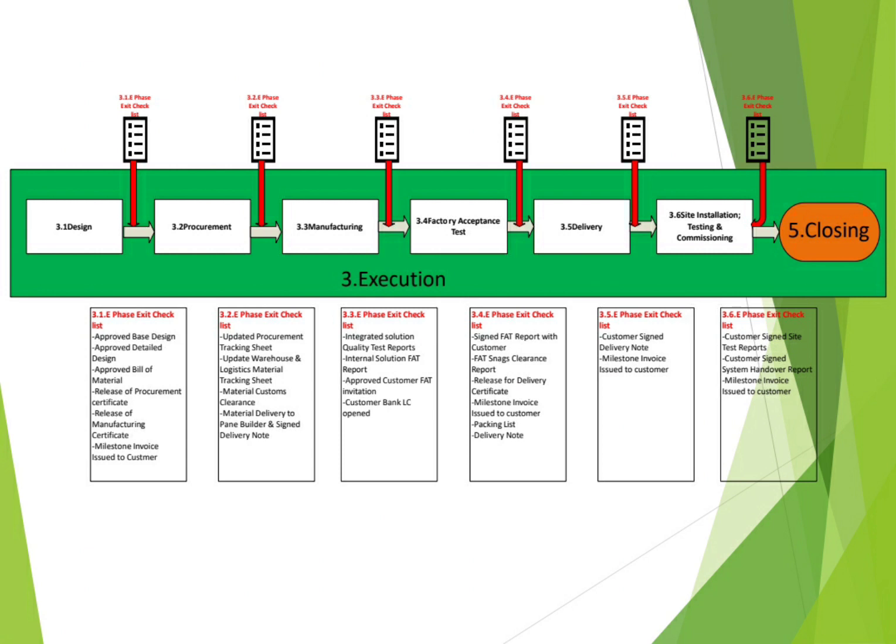After that, once this invoice, if it is available, is approved and you have the release of procurement certificate, you need to proceed immediately with the procurement. In this procurement, you need to ask your technical lead to prepare the detailed bill of material, share it with the procurement team. The procurement team need to start placing the request for quotations, get the necessary quotations.